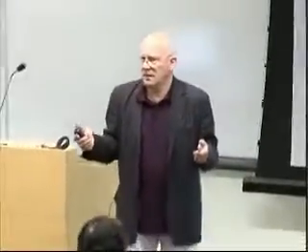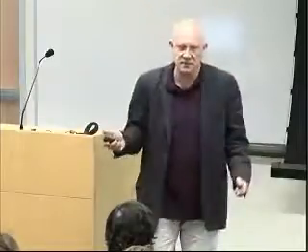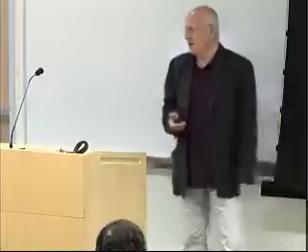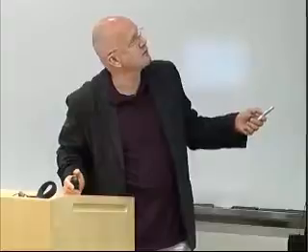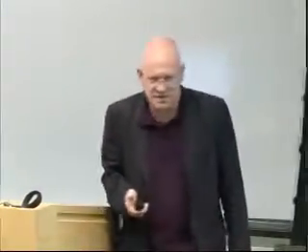The next thing we ask ourselves: there are many criteria, but how to really combine them? That's, of course, a question where tons of research papers are already written, and you can do a lot of elaboration on that. What we did here is basically a simplification of the perfect world view. We have features. We ask the stakeholders for their view of the features from certain perspectives, and we have a three-dimensional scoring. N stands for the feature number, P stands for the stakeholder, there are many of them, and Q stands for the criterion. We combine this by asking the stakeholder on their perception of the candidate features and letting them score on a 9-point scale. That has proven sufficiently detailed, and we should not go overboard, but should make it meaningful to some extent.